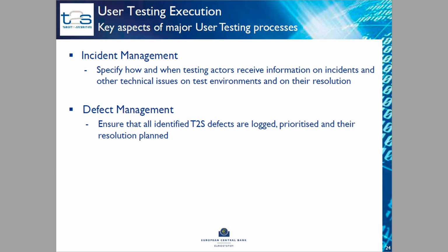Defect management: the aim there is to ensure that all identified defects are really logged with the T2S service desk. They are prioritized and their resolutions are planned. And the user testing subgroup will have, during the execution phase, regular teleconferences, as probably also in the meetings, where the defects are then discussed, analyzed, prioritized, and then it's planned when they could be resolved from the Eurosystem side, as well as we discuss whether it could have an impact on the production as such.